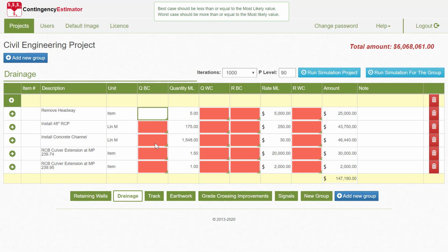And then when I've got them, we can turn around and say, okay, well, what's the quantity of headways? There may only be 4, but it won't be any more than 5. The price could be as low as 4,500. It could go as high as 6,000. Because the tip fees are increasing to get rid of that material.